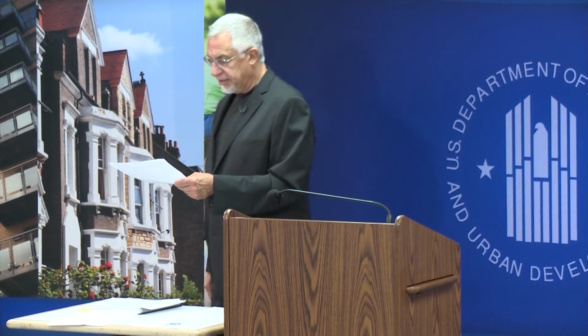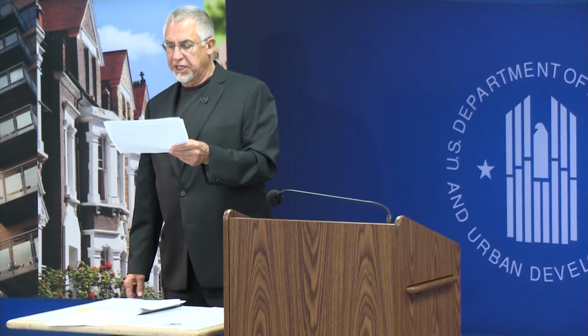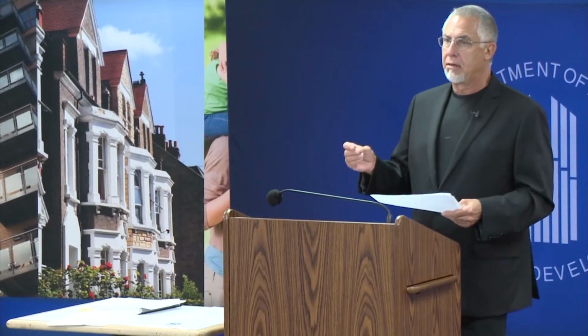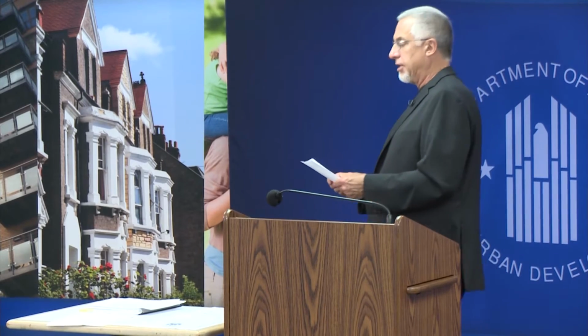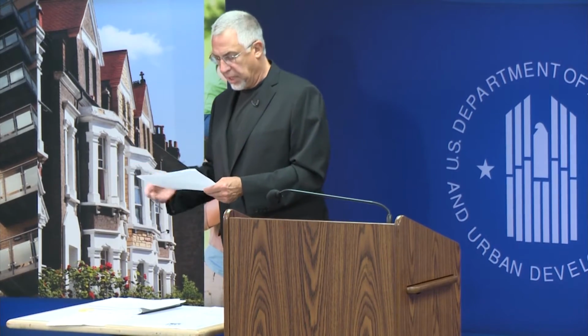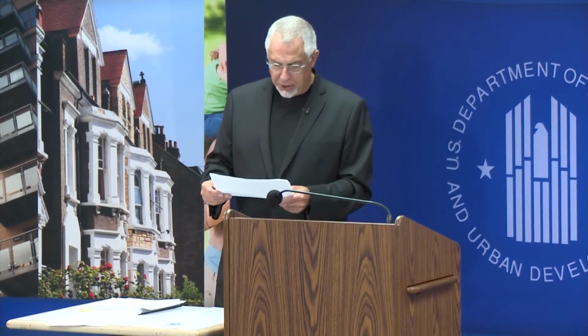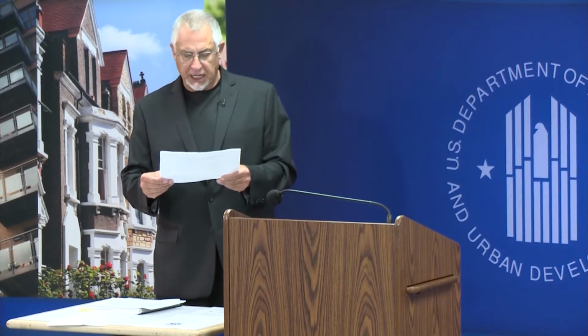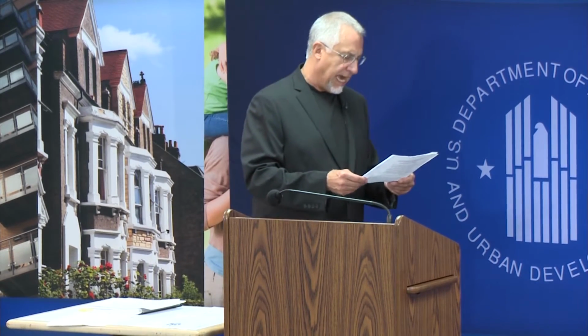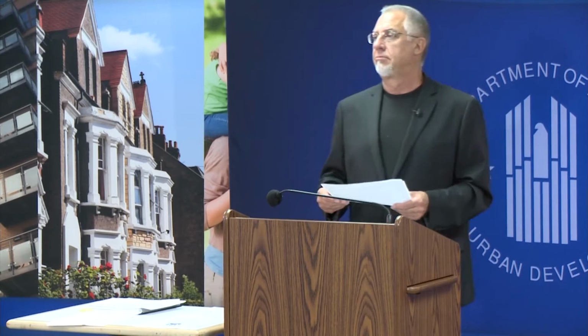Okay, a soils analysis costing $2,500 using ICDBG funds. That would be a micro purchase. That would be a micro purchase, yes, sir, because that's within the $3,500 limit for micro purchases under ICDBG and the uniform guidance, yes. And lumber costing $4,000 using a combination of ICDBG and IHBG funds.